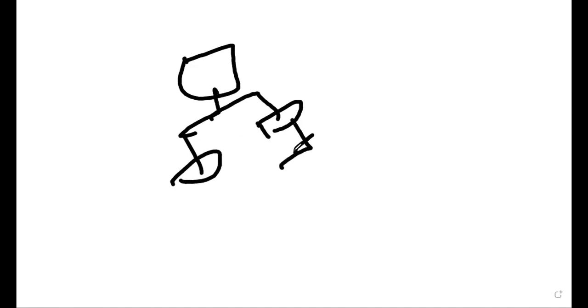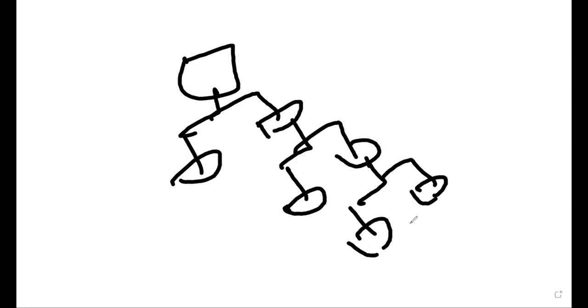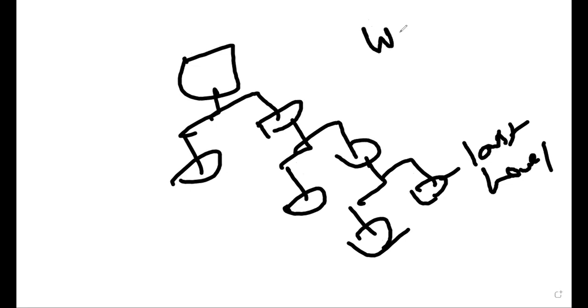Please note down. So that will be your fourth document. You got your major deliverable here and you're breaking that into pieces, right? Where you can manage your work. Maybe this will be the last level, right? So this is the last level. I'm going to stop my decomposition. So what is this particular level called? Please note down the fourth document: the last level or the lowest level of a WBS is called the work packages.